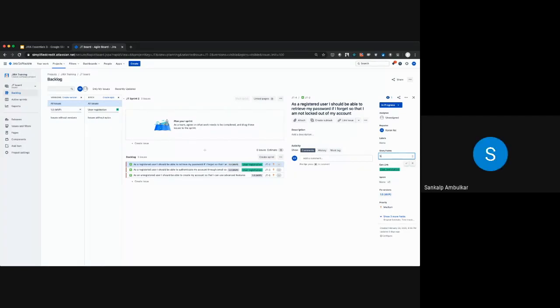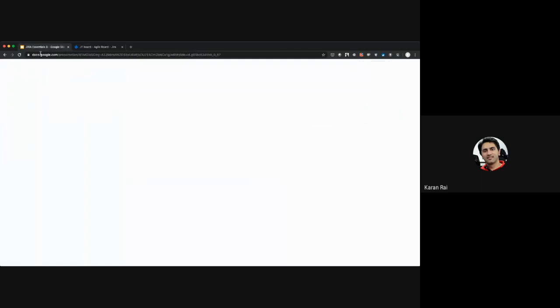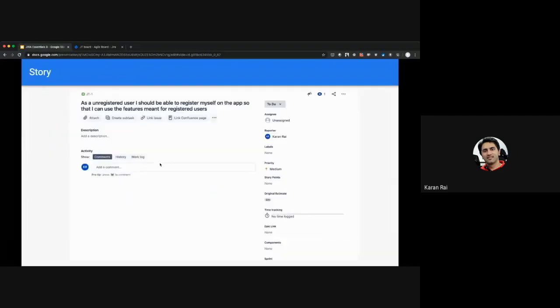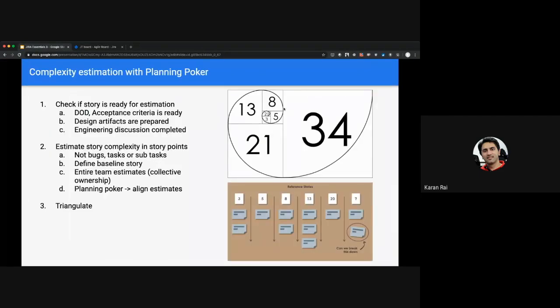Yeah, I will go with 4 to 6 points, I guess. So you've got to use the Fibonacci series. You can choose between numbers 1, 2, 3, 5, 8, 13. And think about relative complexities, like 5 is 5 times more complex than 1, and so on and so forth. So you have to choose between these numbers.